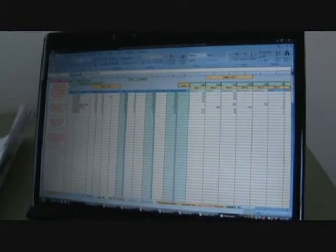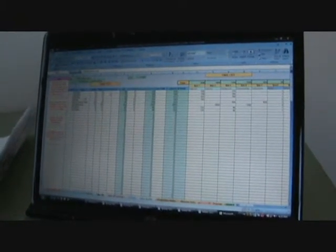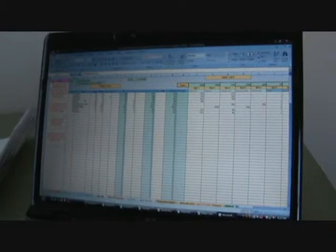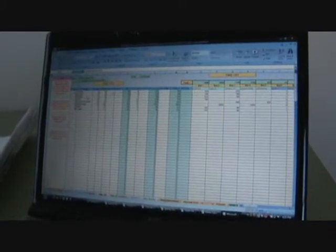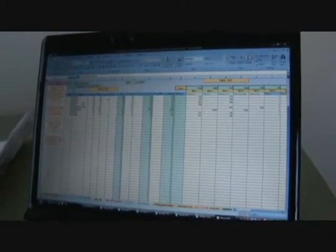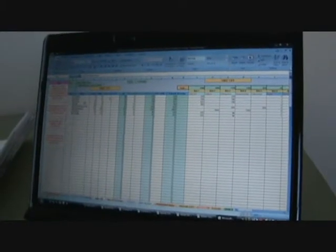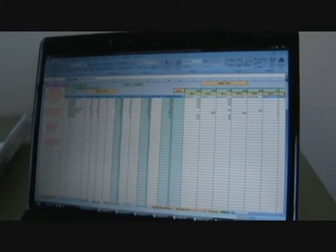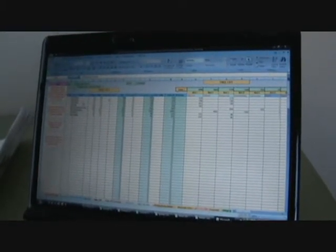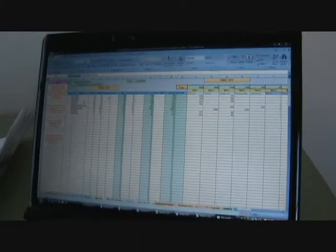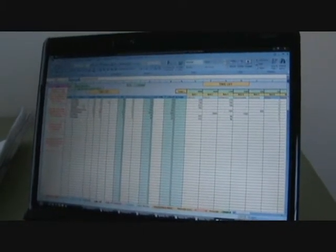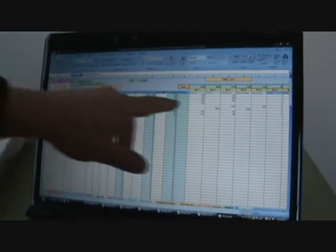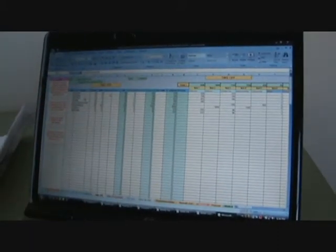So the next sheet is a takeoff. And all takeoffs are doing is you're trying to gather all your quantities, for instance, drywall, ceilings, wall coverings, how many doors. The takeoff is just trying to gather up quantities of different surfaces, or I call them items, items that need to have a price applied to them.